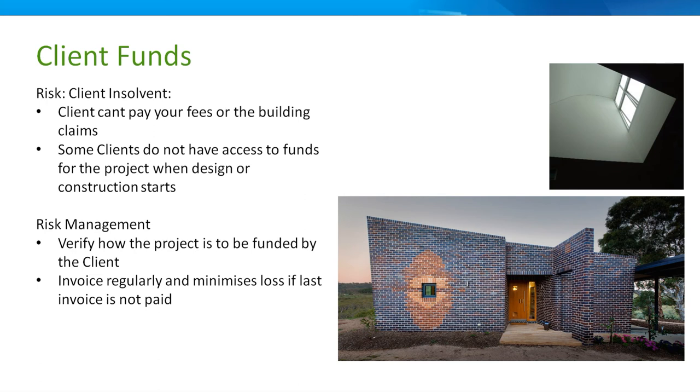We're involved in buildings from Wauchope or Macquarie to Canberra that range in price from $1,800 a square metre to $5,400 a square metre. So I can give them a spread. If they've got 100 square metres, it's that to that. So budget-wise, it's very hard. So we put this job out to tender, and then how am I going for time? I'm probably through 4 slides.